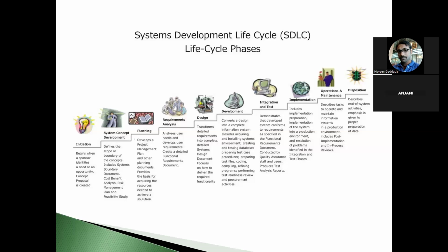Then you need to update the BRD, mentioning in the scope or in the change requirements that, as discussed, we are not going to consider this calculation part in our requirements, and it will not come under the scope of the project, so it will be considered out of scope.